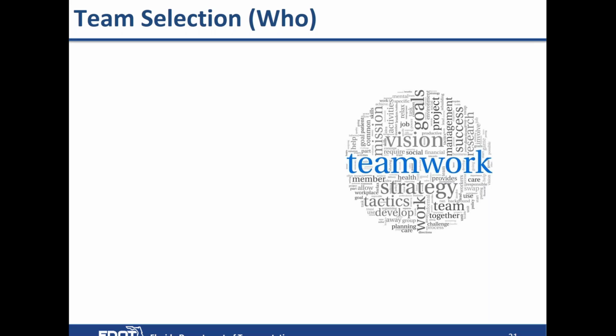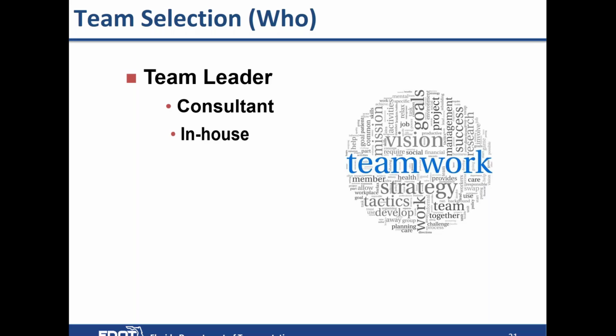Who does the study? So team selection. One, we select a team leader. About 90% of our projects are done by consultant team leaders that are professional engineers and are certified through SAVE International as a certified value specialist.